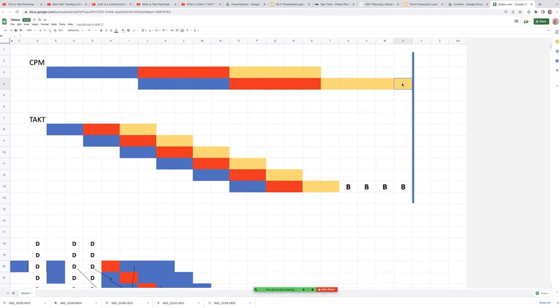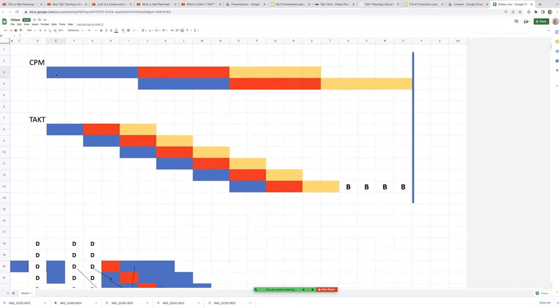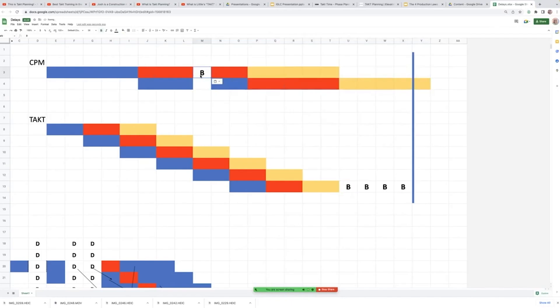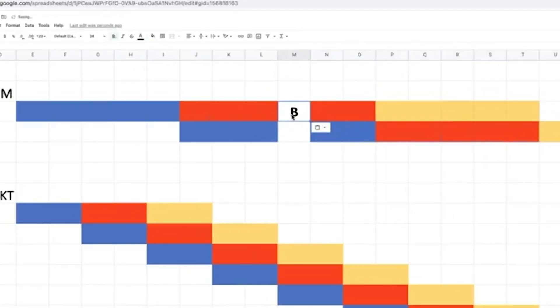So a true, not a builder, you guys are builders on this call and I love you and I support you and I'm proud of you and I respect you and I admire you. But a true CPM system will back you right up to substantial completion. The problem with this is if there's a delay in this system, you're behind substantial completion. So I'm just simulating this as a delay right here.